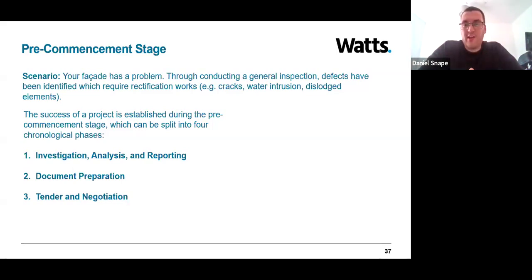But what that does say is that 7 years really isn't very much time for a contractor to set themselves up, market themselves, win work and deliver work. They may only be able to undertake a few projects in that period. So it just goes to show that a lot of contractors and subcontractors can run into issues when it comes to this sort of work if they're not set up for the job. And it's too easy nowadays for companies to close the door and reopen elsewhere. So it's really important that you undertake a check of who you're employing or who you're going to be asking to do this work, and make sure that they're financially stable and they've got a good reputation.